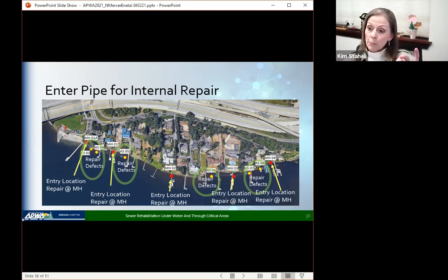We then didn't need any repairs between there and maintenance hole 2, as that area didn't have any bends in it and the liner was in great shape there. So maintenance hole 2 would go in and seal that maintenance hole. We could then also look at access at maintenance hole 3 to go back to angle structure 6 and up to angle structure 7, and then entry into maintenance hole 4 to go back to angle structure 8. So, a pretty complicated scheme, but generally going through 4 maintenance holes and going back in the pipeline to the area where there are bends in order to repair these holes. Next slide.